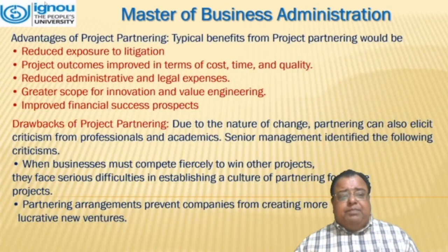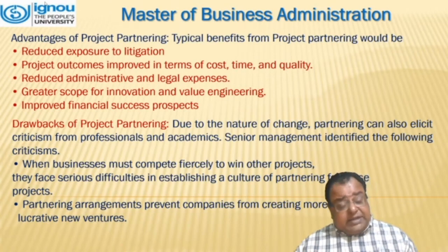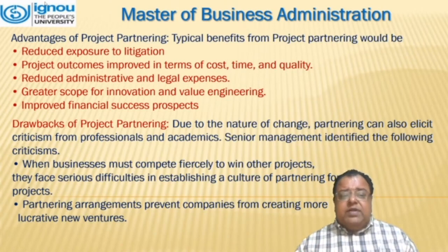What are the advantages of project partnering? Typical benefits from project partnering would be reduced exposure to litigation, project outcomes improved in terms of cost, time, and quality, reduced administrative and legal expenses, greater scope for innovation and value engineering, improved financial success prospects.